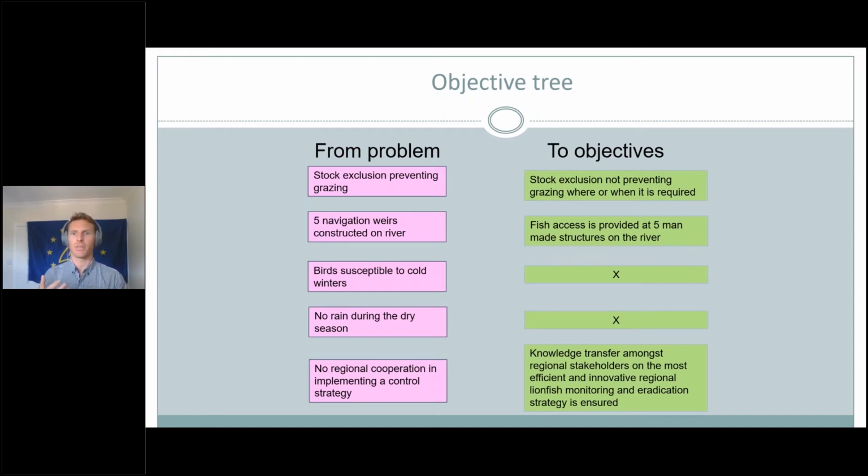They are issues which may be assumptions which could prevent your project success and therefore be included in your project later as assumptions. So, for example, your project may be progressing very well, but a severe winter could reduce the population of birds and therefore impact the project's overall success. Therefore, your assumption is the severe winter will not happen. This is a relatively quick process, but essential.